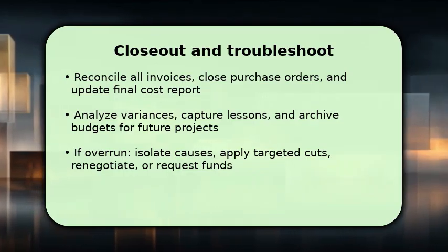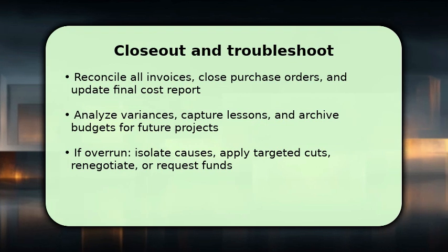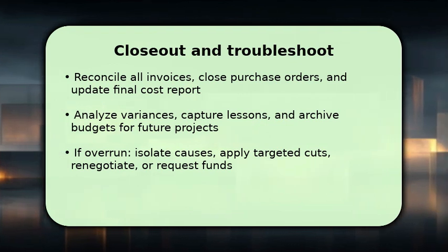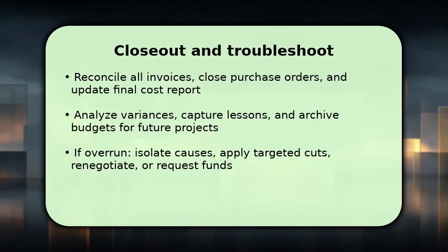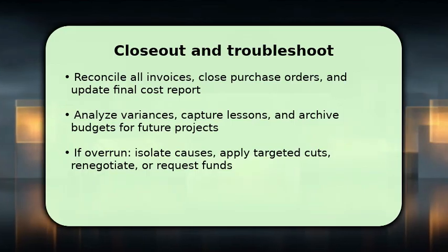If you face an overrun, isolate root causes quickly, apply targeted cuts to non-essential scope, renegotiate vendor terms, or prepare a concise funding request showing ROI. This troubleshooting keeps governance intact and decisions fast.